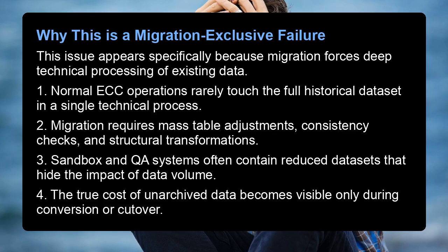Why this is a migration-exclusive failure. This issue appears specifically because migration forces deep technical processing of existing data. 1. Normal ECC operations rarely touch the full historical dataset in a single technical process. 2. Migration requires mass table adjustments, consistency checks, and structural transformations.